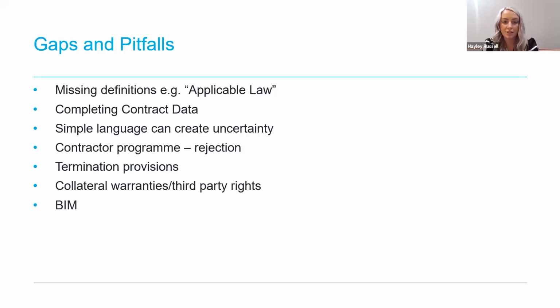The termination provisions also need to be carefully considered and amended when necessary. The arrangement and presentation of the termination provisions in NEC contracts is helpful, with a defined list of termination reasons, with a procedure to follow and an amount due for each termination reason, depending on whether it is the employer or the contractor terminating. Although there are 21 reasons for termination, the reasons are fewer in scope than most practitioners would be used to or would expect.